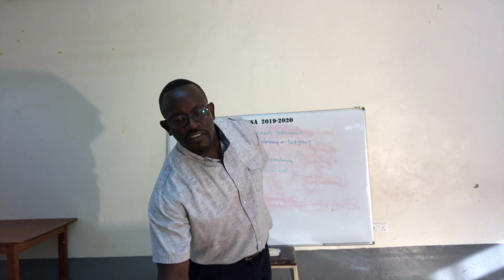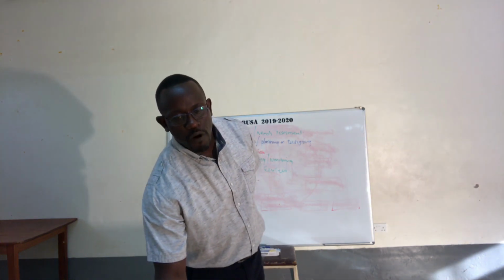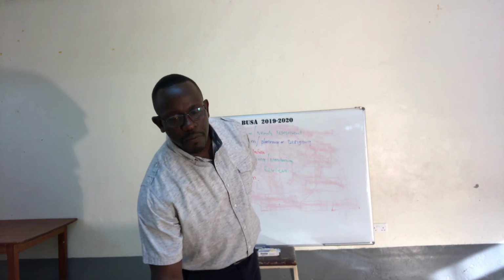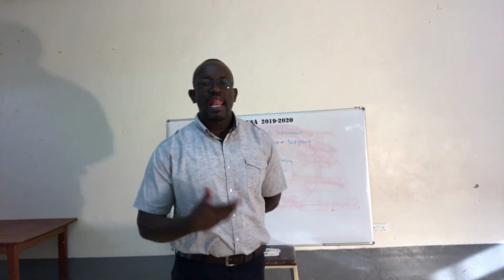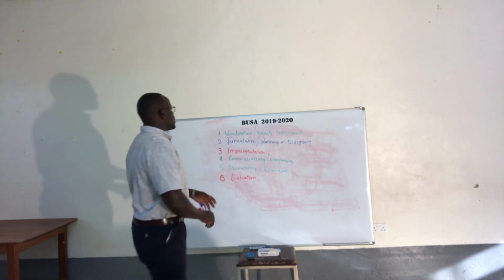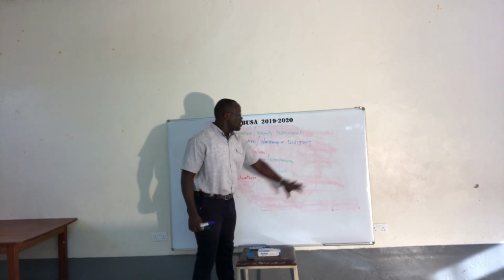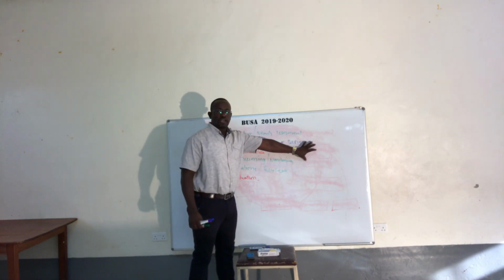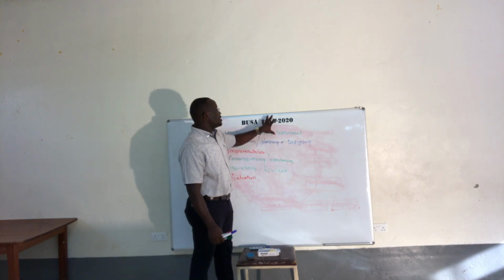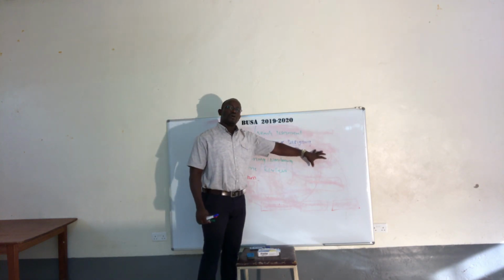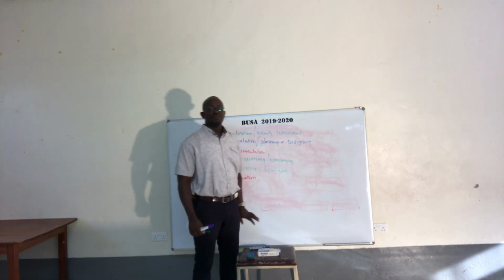The first, the cyclical form, retains the idea that project development should be a learning process. And that's why I was telling you that if you have a plan in the implementation, you don't come direct to correct it at the design. You come to the needs assessment, come to the project design, and then come to implementation.